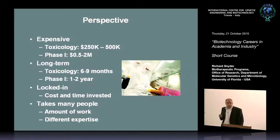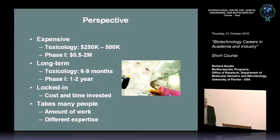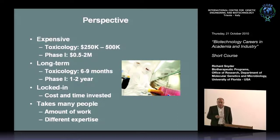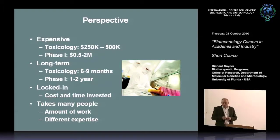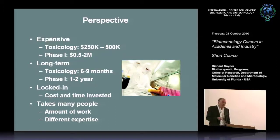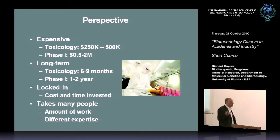The perspective is that this is very expensive. Toxicology costs upwards of half a million dollars. A Phase 1 human clinical trial averages at least a million dollars, probably more like two million. It's long-term — as a scientist you're used to getting answers fast, but here the cycle is measured in years and months. If a commitment were made today to take a gene to the clinic, it wouldn't go into a human being for probably 18 months to 2 years, if you had the money today.